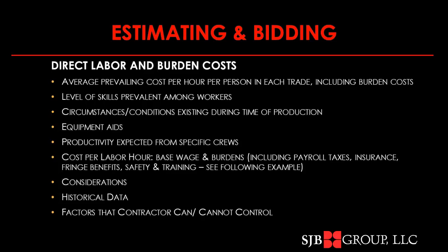And you want to make adjustments to come up with a baseline rate. You don't want to use one that's overly optimistic. You want to use the one you can count on as reliably, regularly achievable. Some factors that contractors can control: the quality of supervision, the skill of the labor, the types of tools and equipment you provide.